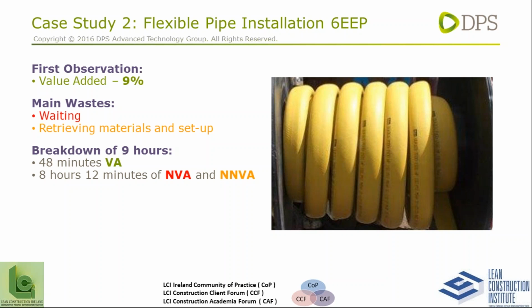Waiting was predominantly because the guys were waiting on consumable materials to be brought to the place where the installation was occurring. The main reason for this was because the storage location for these materials was up to 1 kilometer away from where the actual tool install was taking place. So you can imagine the distance traveled there and back and the waiting time. While somebody's waiting for the materials, they can't be installing them. So there's a whole portion of waste there.